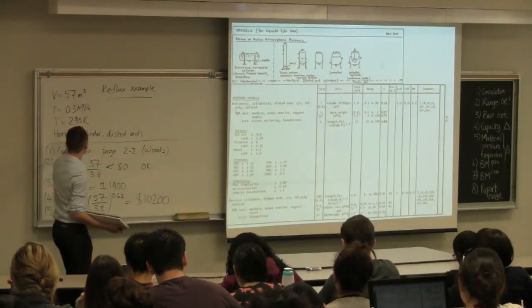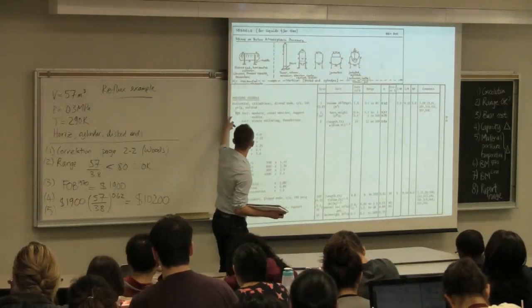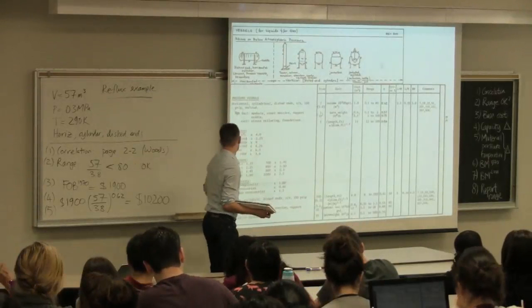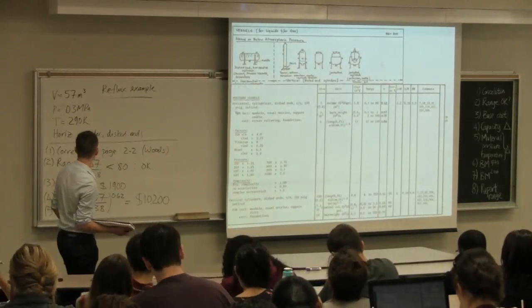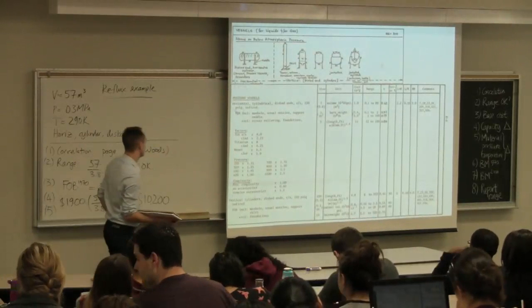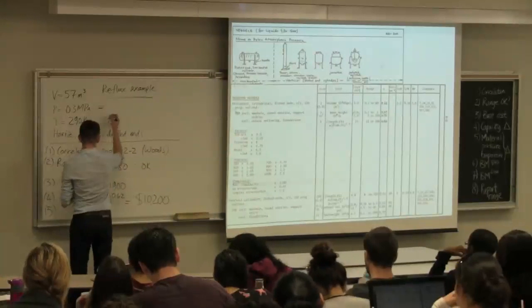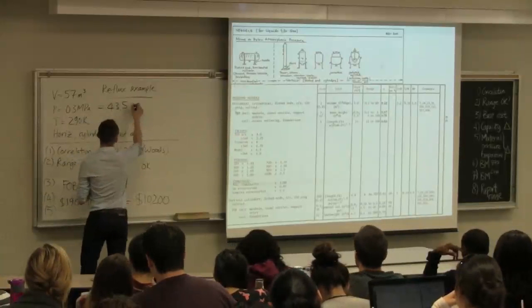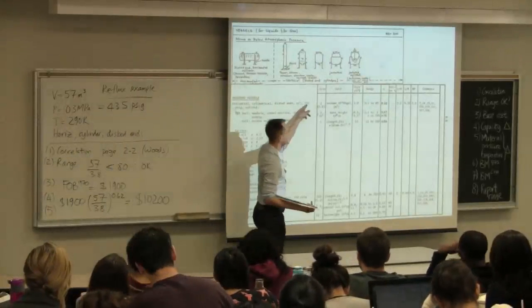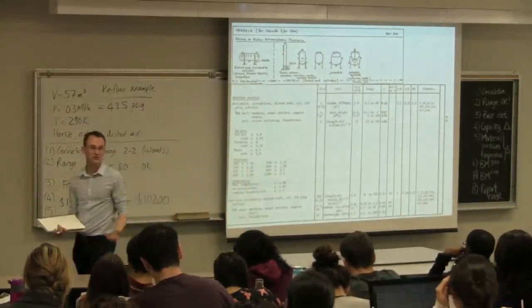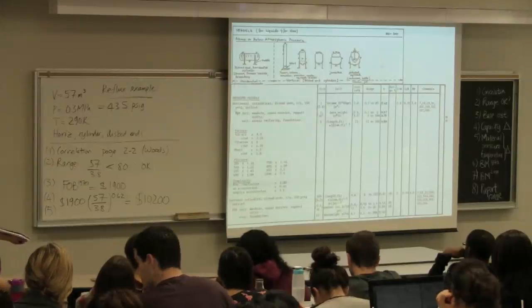We're operating this unit at ambient conditions, 298. There's no specification here on temperature. So these are generally at ambient temperature, so we don't need to adjust the temperature. And pressure is 0.3 MPa. 0.3 MPa is 43.5 PSIG. So this unit's rated up to, this base case is 150 PSIG. We don't need to adjust the pressure either. We're well within the base case range.